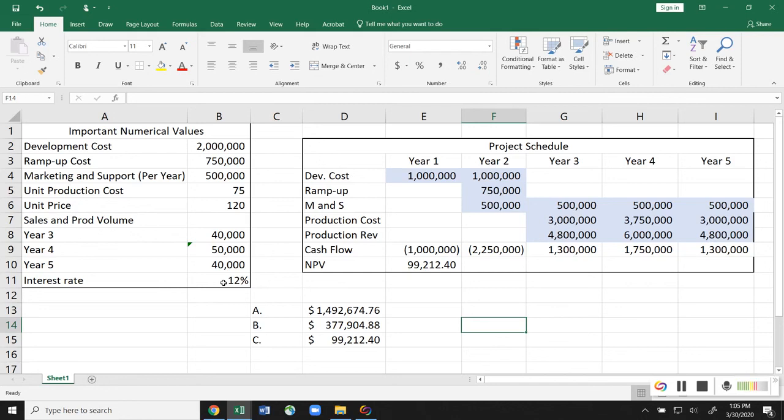secure is the discount or interest rate? How secure is this project? Does our company need to do this project anyway, or is this something that's optional for us? What's it going to do to personnel? This is where it's a lot deeper of a conversation. And obviously, you have some of that conversation with all projects, but you really have to analyze as the net present value gets closer to zero, whether or not a project is worth it.